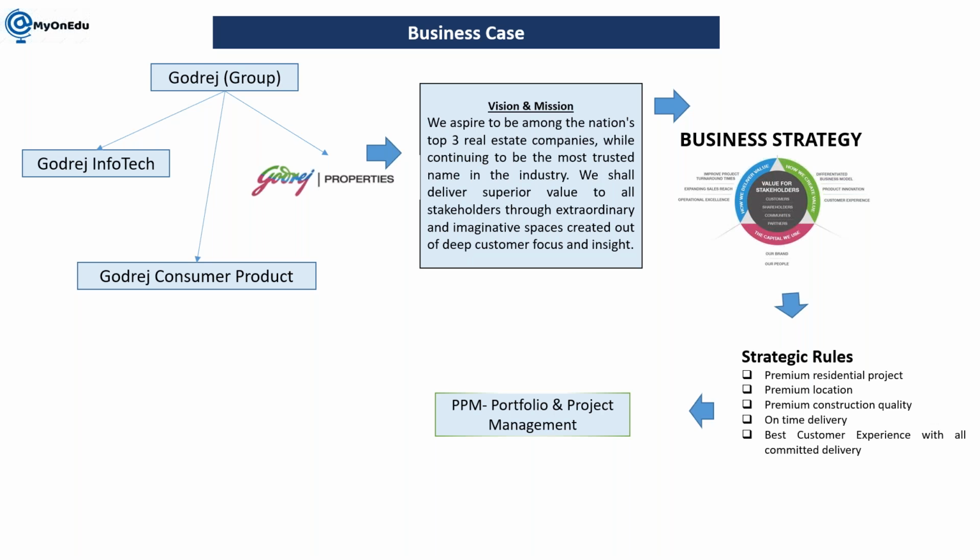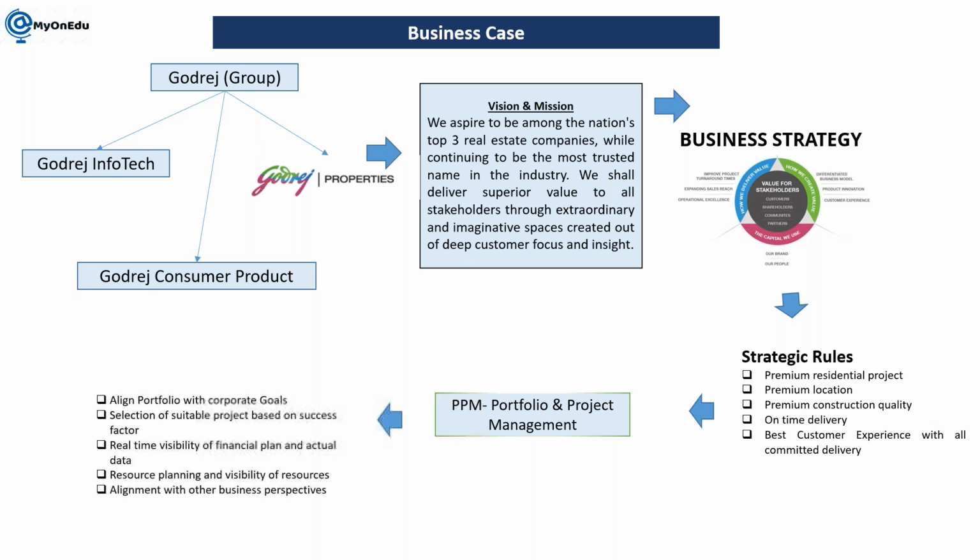So there is one process of pre-investment analysis here. When we are understanding this project's KPIs and so on, like how beneficial this project will be for us, we can calculate things like NPV, net present value. Based on these different values we can find out whether this proposal is beneficial for us or not. So here PPM is helping us manage all these things.